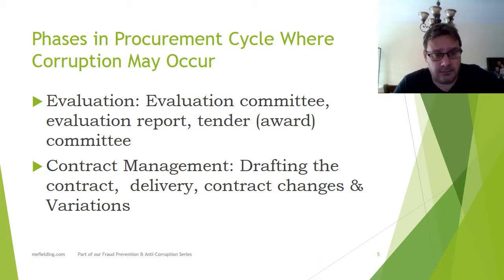Again, you need to look at delivery. Our point is what can go wrong with procurement. What you can find is that if you're trying to catch people out, that we pay on the 1st of January and delivery is on the 31st of December. So the guy gets a free working capital loan for a year. And so those are the kind of things that you're looking for. And you do see them. Certainly in places like Russia, I've seen stuff like that cropping up.